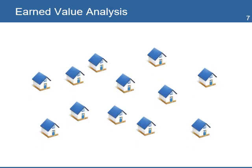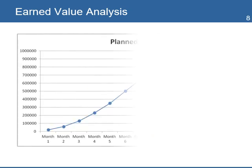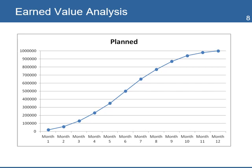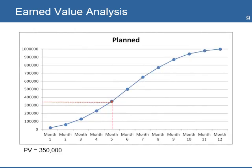Let's look at an example of how to use EVM. A project to build 12 rural health centers in 12 months at a cost of $100,000 each. The total budget is $1,200,000. Your plan is to complete one center each month. You develop a chart that shows the planned value of the project over the 12 months — this has the shape of an S-curve. On month 5, you plan to have made expenses in the value of $350,000.